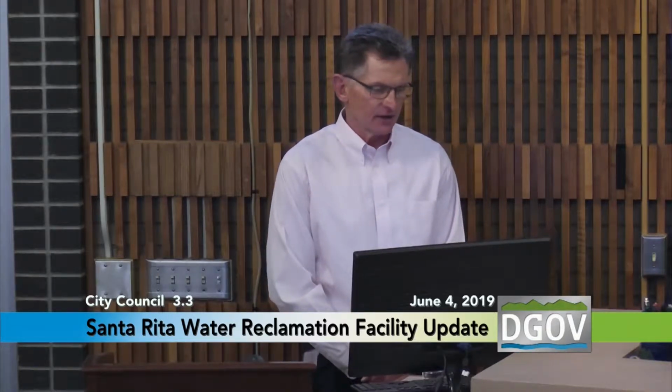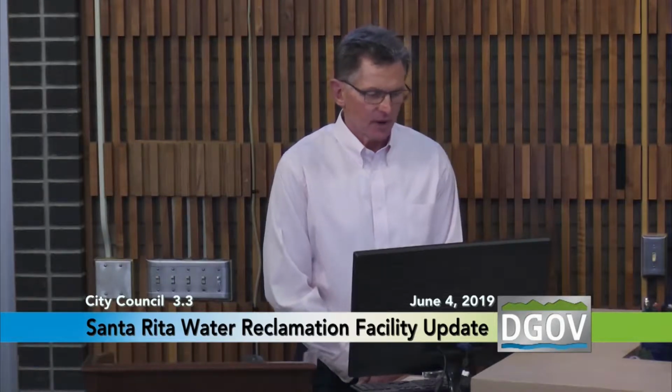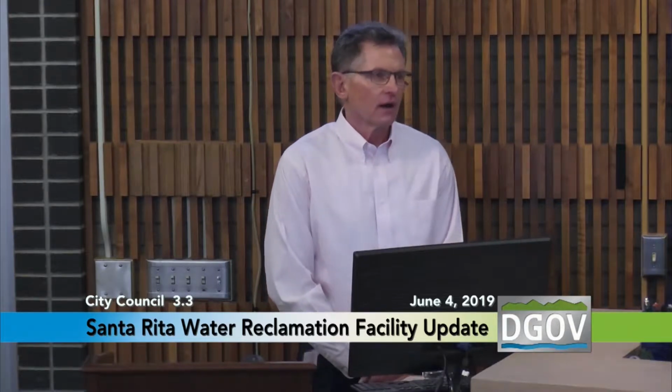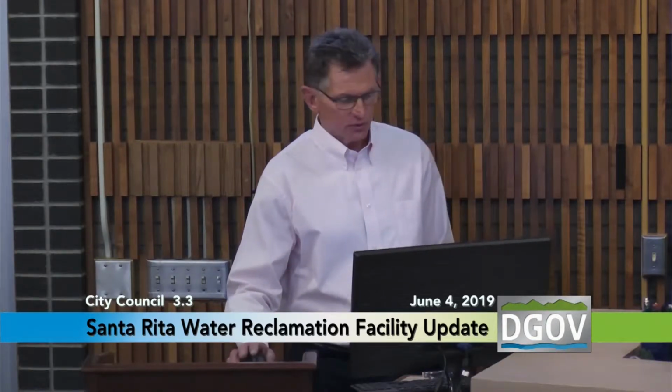Periodically, we get a new discharge permit from the state. The state issuing authority is the Department of Public Health and Environment, CDPHE, the Water Quality Control Division. We were supposed to get a new permit in May of 18 due to state staffing shortages. They didn't get that permit to us until April of this year, and it's still under review. But that date of May of 18 is important because we had to do some milestone completion of construction in order to meet that schedule.